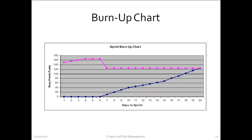This is a similar chart known as a burn up chart. Rather than counting down from what you have to implement, you're counting up. The pink line is the total amount of stories to implement and the blue line is the number of stories implemented at each iteration. As you implement more and more stories, the blue line catches up with the pink line, and when the two meet, the project is considered over.